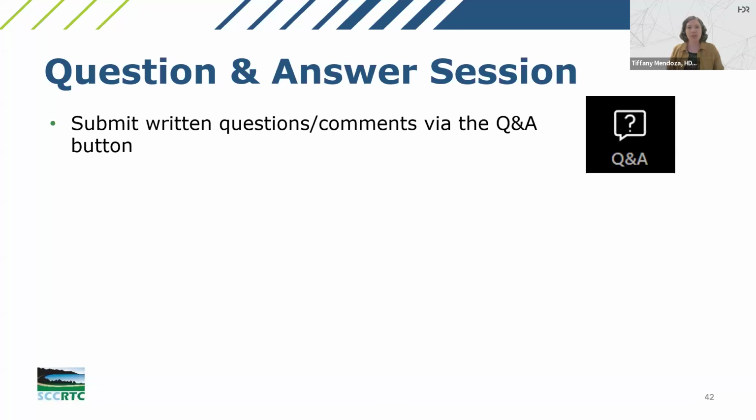Sure. The next question we have is asking if we could speak to how capital cost contingencies are determined. Yep. Thank you, Tiffany. So in a nutshell, the contingencies are determined based on the level of design that you have, as well as basically how many of the questions that we have about what the final design would look like are still unanswered. For maybe just a little bit further detail on that, Mark, can you explain how we developed our contingency for this cost estimate?